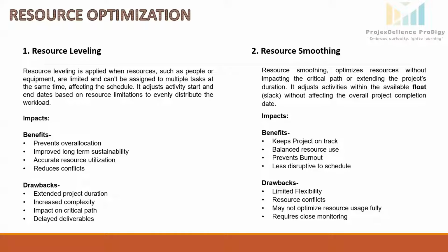Similar to leveling, when we apply smoothing, it will also impact the project. So what are the benefits? Keeps the project on track. Unlike leveling, smoothing works within the existing project timeline and ensures that the project's completion date remains unchanged, which is advantageous when deadlines are fixed.